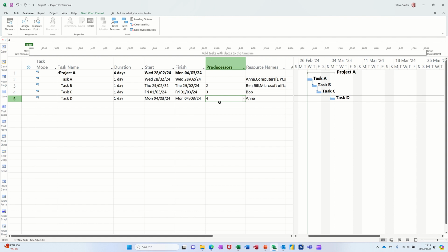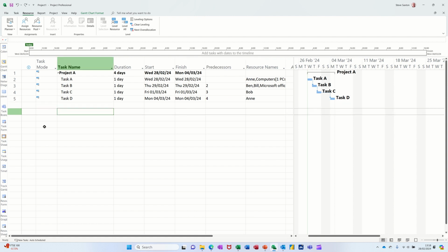There we go, get it back. So now she's not over allocated. So that's the planning phase done. So what you now do is save the whole thing, the whole project as a baseline. So to do that, you're going up to project and you're setting the baseline.